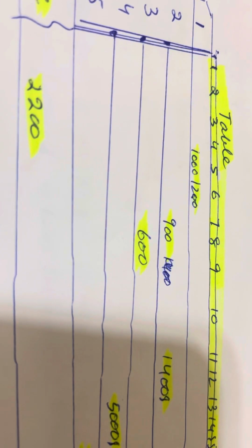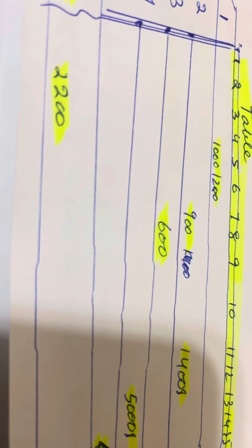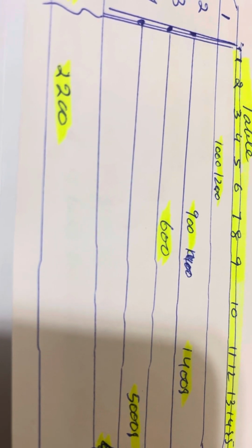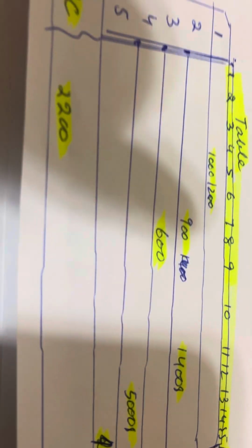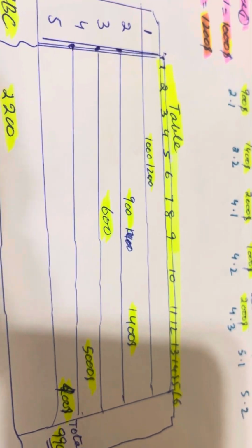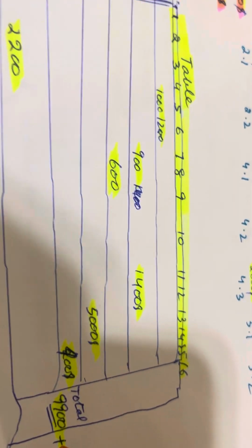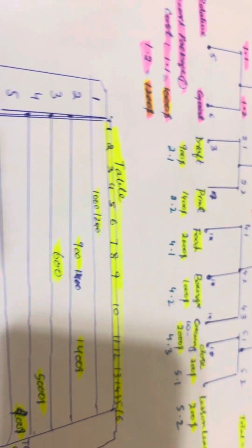Like here, the next column is 2, so 2 plus 2 is equal to 4, so 4 goes here, and then there is the 8, so 8 plus 5 is equal to 13, like this. So that's called cumulative, because you divide all the money you spent, all work package money, on the timeline, so it's easy that anytime you can check it.